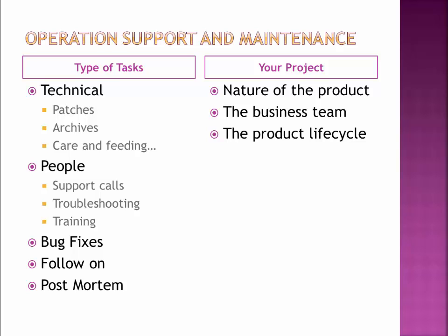And so we need to understand what's the follow-on. Are there things from this project that are going to be implemented later that other projects need to know about, that I need to be able to pass along or get prepared? Or there are configuration options or things like that that have to be understood. And then for our project, are we going to go back and do a post-mortem? Look at what we did well, what we did poorly, how do we learn from that? That's something else that might show up on your project plan.